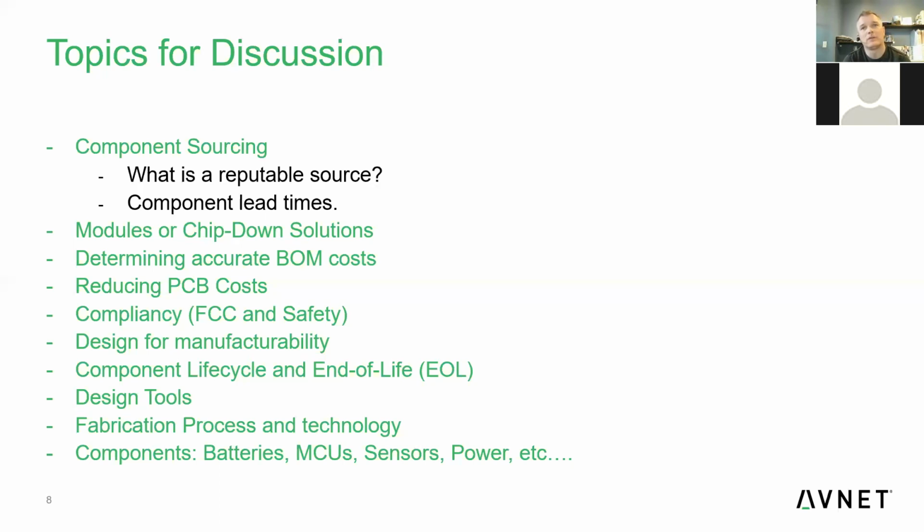And if you're working through a CM, they're going to be doing this on their own. But if you're doing all this on your own, the manufacturing and everything, then I'd definitely recommend every 30 to 60 days for sure. And a lot of these things will get flagged. So if you do have something that goes end of life, you're going to be notified and you'll have lots of time to respond to it.